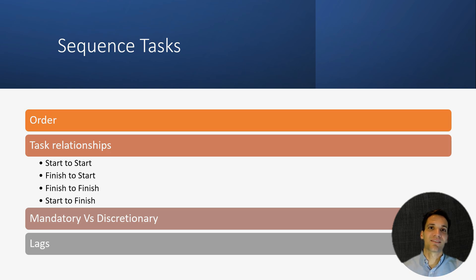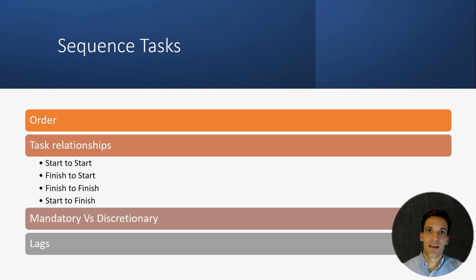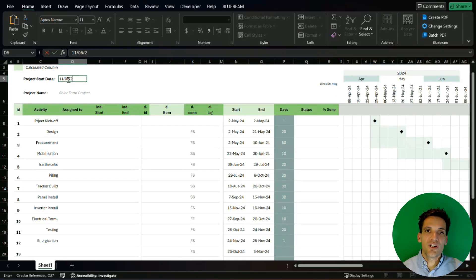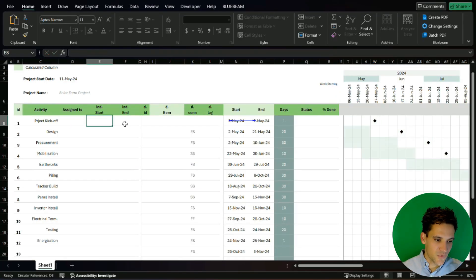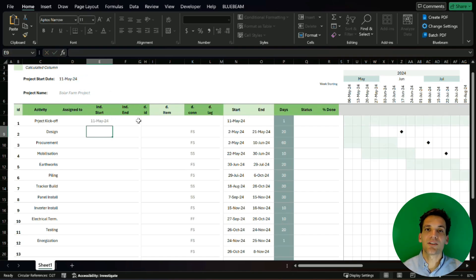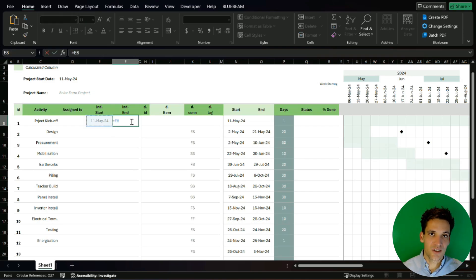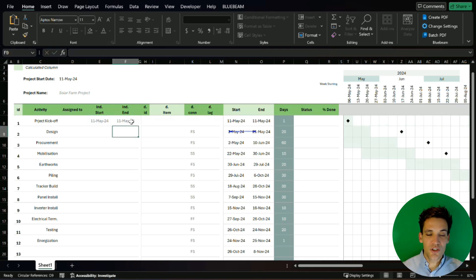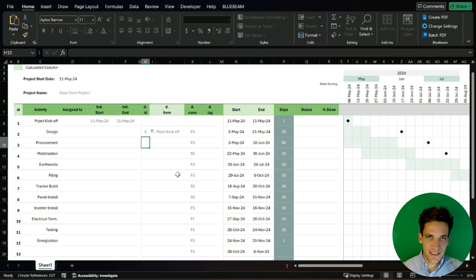You can also have lags — two tasks with a gap between them. For example, once you've poured a concrete foundation, you might have to wait 28 days for the concrete to cure before you can start standing structural steel, so you'd put a lag between those two tasks. To set up the schedule, enter a project start date and manually link that to the first activity, then add the duration of the first task onto the manually set start date. The more effective way is to link activities and put in place relationships between them, because as you adjust things the whole schedule will recalculate.